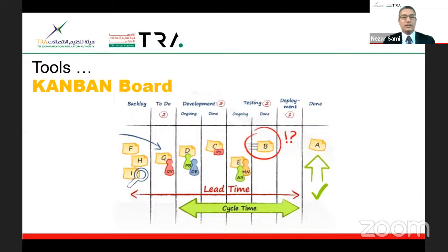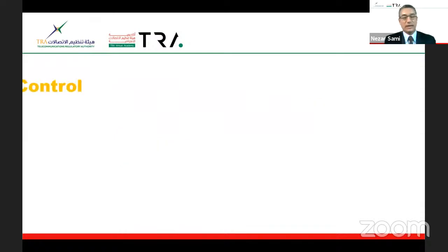Or do a mathematical model: a simple calculation, A plus B, can equal some amount of time. Or we can go for the optimistic time and the pessimistic time, where everything is bright and clear, or we struggle, what we call the best case and worst case scenarios. Put these activities together in a sequence, in a logical framework. Remember the words logical sequence: what is the predecessor, what is the successor. This is the secret sauce of implementing your successful idea.